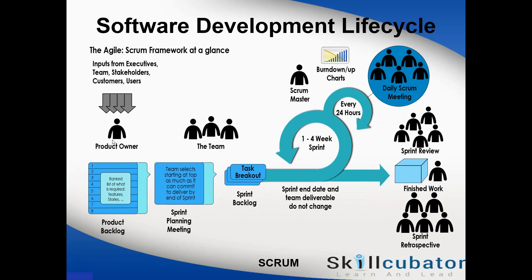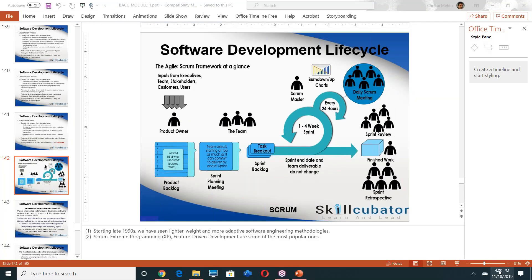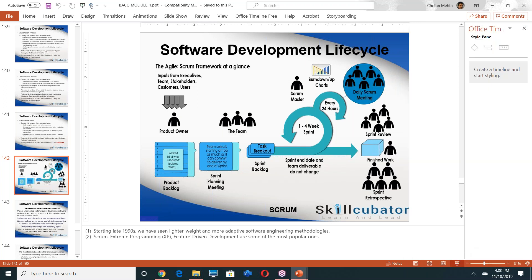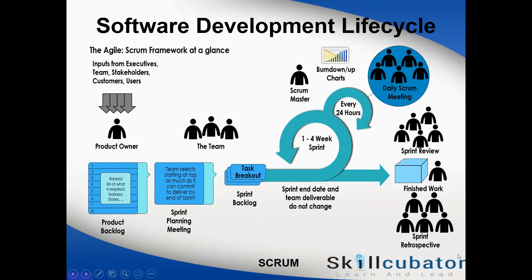Once the team puts all PBIs into the sprint backlog and reaches their velocity limit, the sprint scope is locked. The scope of the sprint is what's included in the sprint backlog — for example, 10 PBIs. Once the sprint starts, you should not change that scope.